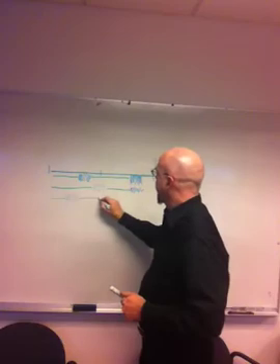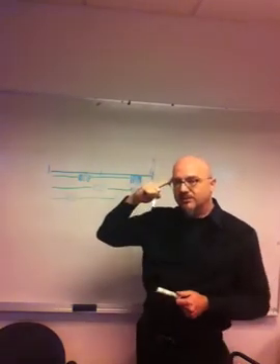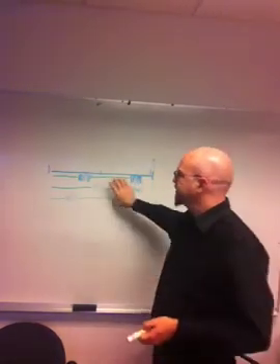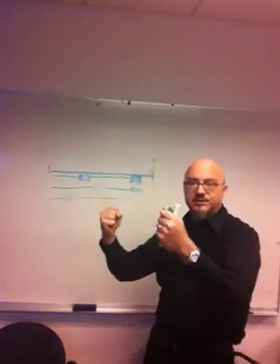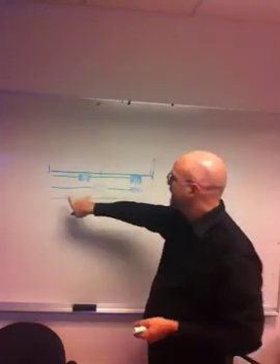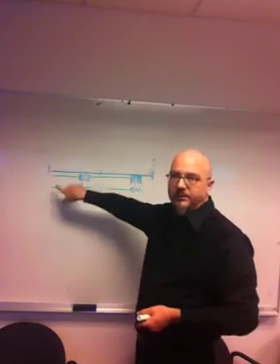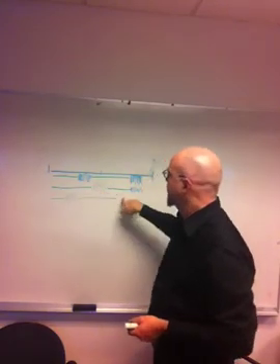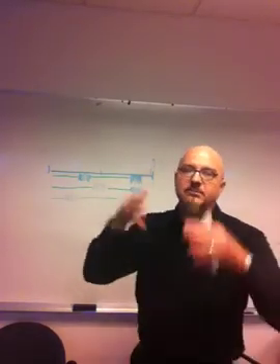So in your sprint planning, be sure you're taking on and you're thinking through, okay, we have 3 developers, and we have 6 stories that we've broken down to nice small sizes so that they're less than 1 sprint's worth. So I want to pick a biggish one, a medium one, and a small one, or a big one and a small one to do to begin with, so that I can start the cadence of the tester, so that the tester isn't hit every 3 days and boom.